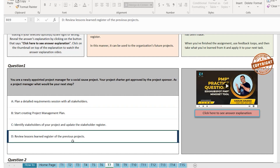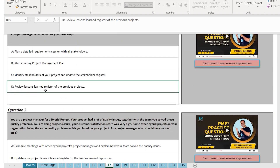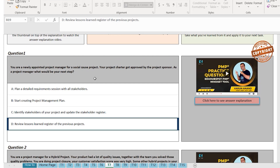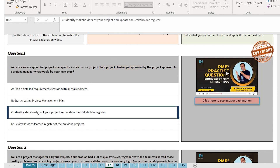Option D: review the lessons learned register of the previous projects. Now, just because I discussed the topic on lessons learned, many people will pick 'review the lessons learned register of the previous project.' But that is incorrect. Where did the question say that you have done a similar project in the past? If it had mentioned something like that, you would go back to the lessons learned register. But it's not mentioned. So methodologically, if your project charter is approved, your next step is to identify the stakeholders. The correct answer is C.